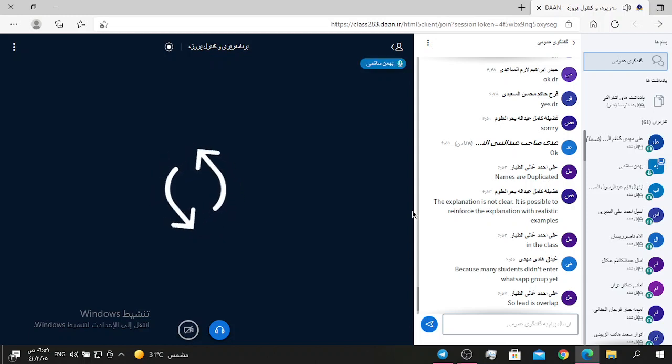Now I want to speak about the lag. A lag is the amount of time a successor activity will be delayed with respect to the predecessor activity. This is related to the delay.